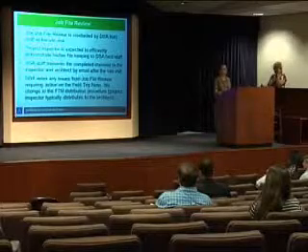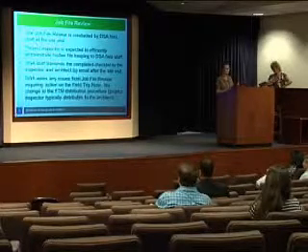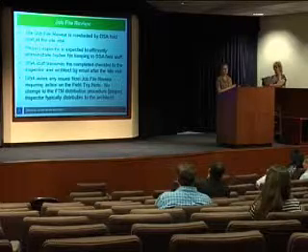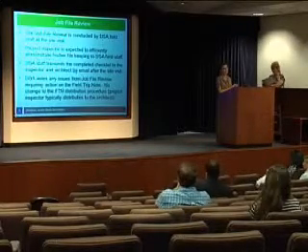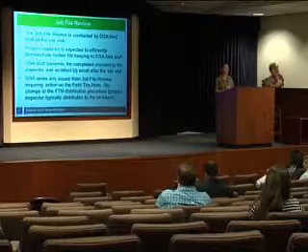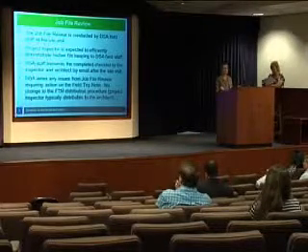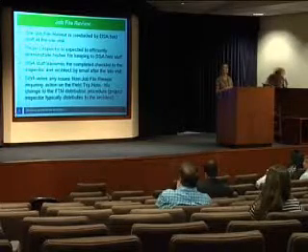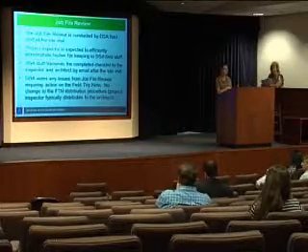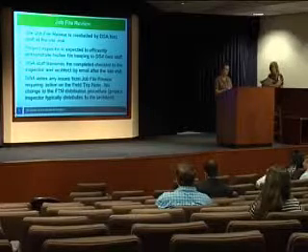And there's also this document that DSA has long been using, which is called a field trip note. That's the document that basically summarizes the site visit, including construction observation, and tells the architect and project inspector if there are any things that need to be corrected, documented, and so on. Those things are documented in the field trip notes, so we're keeping that document intact. We're not changing it. If, for example, the job file review shows that the inspector doesn't have a DSA approved copy of the plans and specifications, that's a major problem because the inspector can't inspect to documents that are not approved by DSA. So the field trip note would indicate that the architect is being directed by DSA to provide a DSA approved copy of plans and specifications to the inspector to use in inspection. That would be the direction provided in the field trip note.